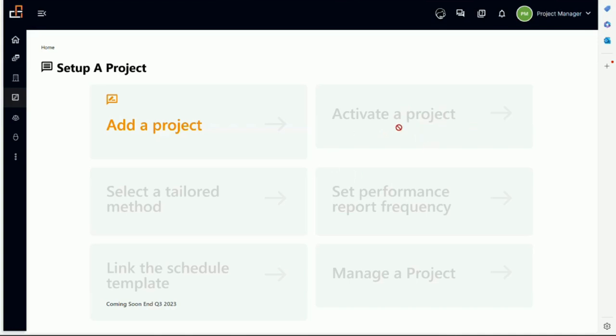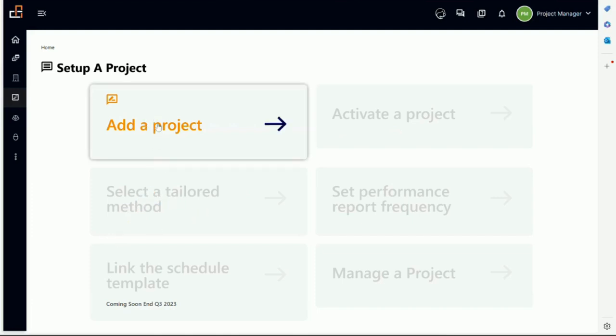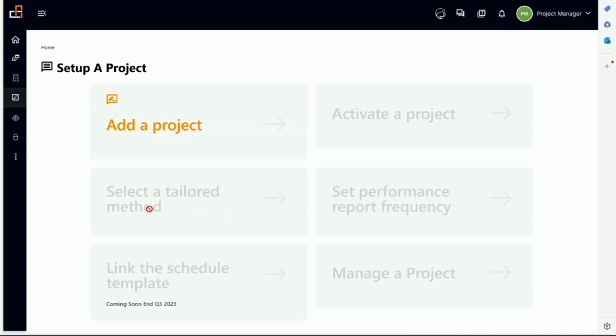And then once it's activated, it comes back to the project manager, to the assigned project manager, which could be different than the one who set it up in the system, right? Because when we activate the project, the sponsor will also designate a project manager. The project manager will select a tailored method and then set the performance report frequency.